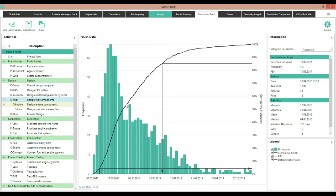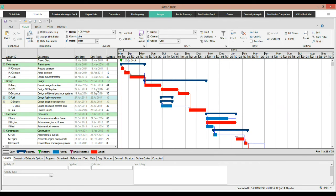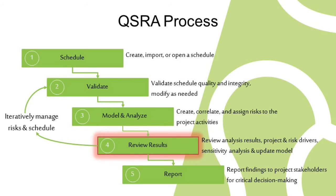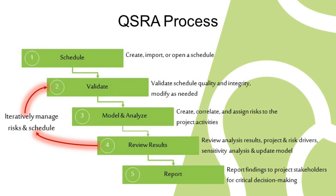Rusty, I noticed a schedule there. How important is that to the way this product works? Well, it's absolutely the centre of quantitative schedule risk analysis — it's the heart and soul. We need a scheduler that's robust and accurate. It needs to be able to handle different relationship types, resources, calendars, and it needs to be fast. It's not only important for the analysis. If you think about the actual risk process, after you review the results, there is this iterative step where you need to go in and manage the schedule and probably change it. If that process involves you having to go back and re-import the schedule every time you want to make a change, the whole process becomes much more time-consuming.